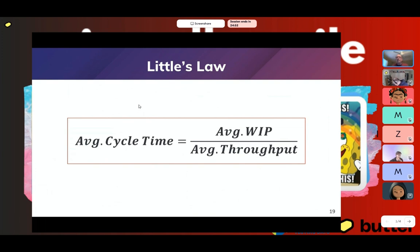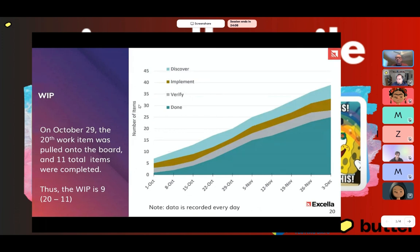Little's Law is beyond today's full discussion, but it looks like this: average cycle time equals average WIP divided by average throughput. This formula is governed by five very important assumptions. You cannot simply plug in a WIP and a throughput and expect to know what your cycle time is going to be — that is not how this law works. It's more of a retroactive law. After you've built out something in your CFD, you can use this to understand the relationship of these metrics.